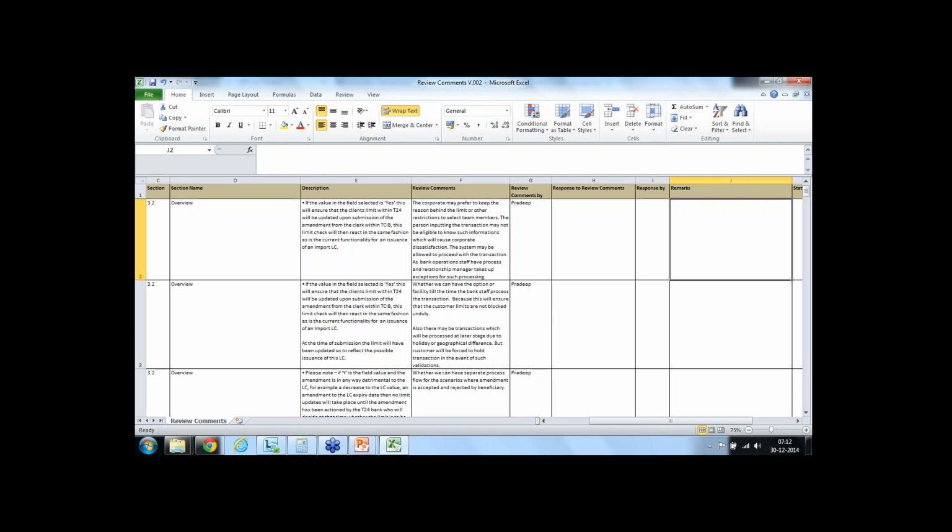If it's a totally new project, you need to check which components in your project are impacted by this change request, and you need to provide an estimate, because every task needs some kind of time. So if you are preparing a document, say some flow charts, and any changes happen to your requirement, then you need some time to accommodate such changes into your flow chart.